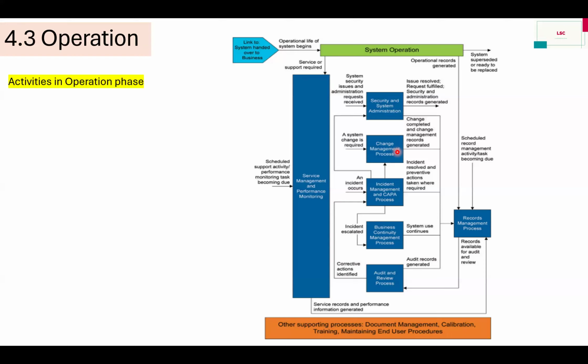In the same way, one terminology is known as the repair activity. Sometimes we have to repair something. So repair activity is also there. In repair activity or replacement activity of a defective computerized system, which is often but not exclusively hardware or infrastructure related, this should be managed according to the defined process. Such activity should be authorized and implemented within the wider context of the change management process. So if you are going to repair, this is also under the change management process.